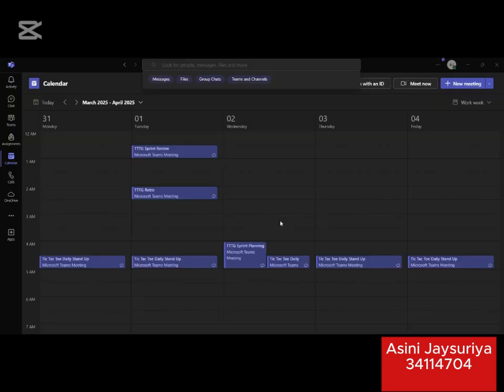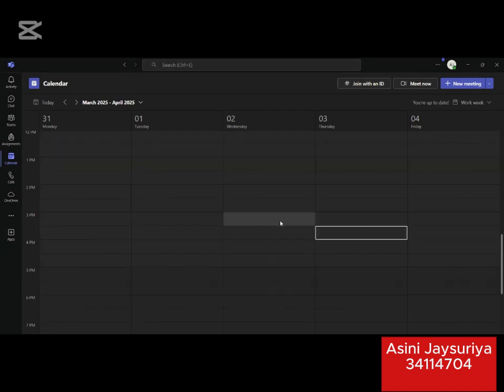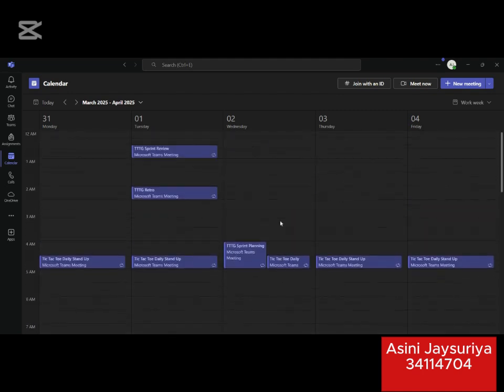And finally, when it comes to the meetings, at the start of each sprint, we held sprint planning meetings where we discussed our upcoming tasks, estimated efforts, and responsibilities. We also held short daily stand-ups to ensure everyone was on track and to check for blockers. At the end of each sprint, we had the sprint review meeting and also the retro to reflect on what went well, demonstrate what we built, and get feedback from the team. This structured approach helped us stay aligned and complete all 3 versions of our prototype on time.